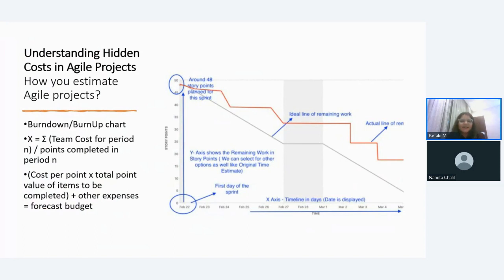Having said that, when you have at least a high-level set of features zeroed down upon, you can estimate those very high-level features and provide a ballpark estimate, right? And since human beings are so bad at estimations, that's why we brought in the Fibonacci sequence and so on and so forth to establish a range of difficulty or ambiguity in a feature that needs to be delivered.